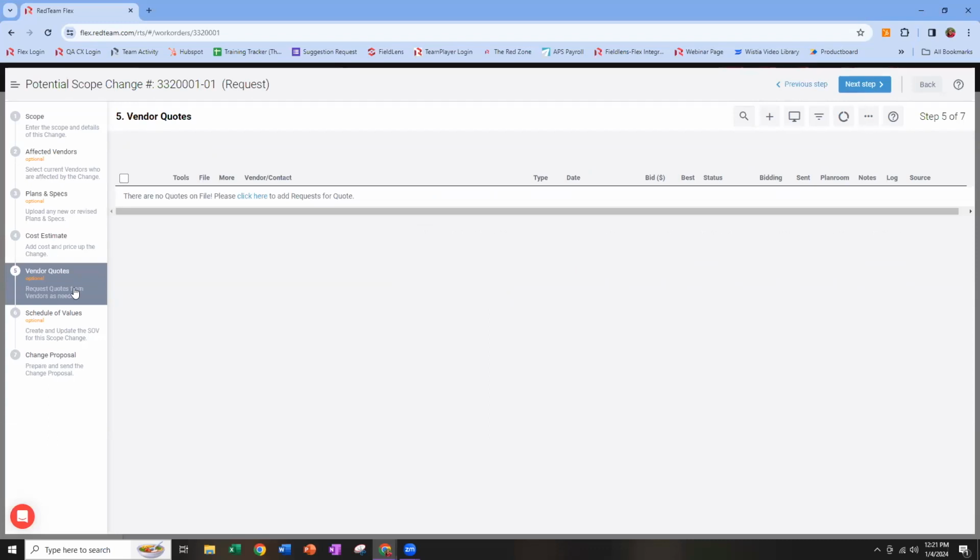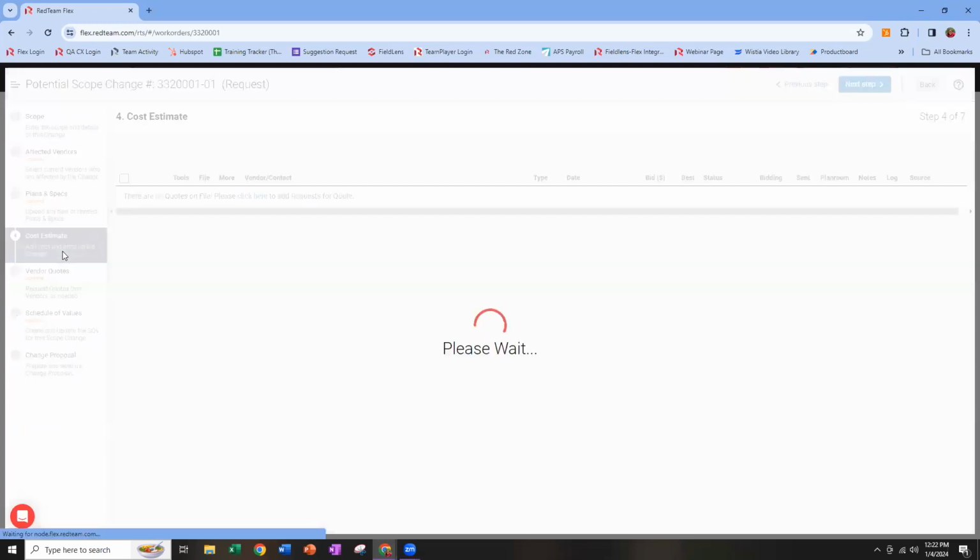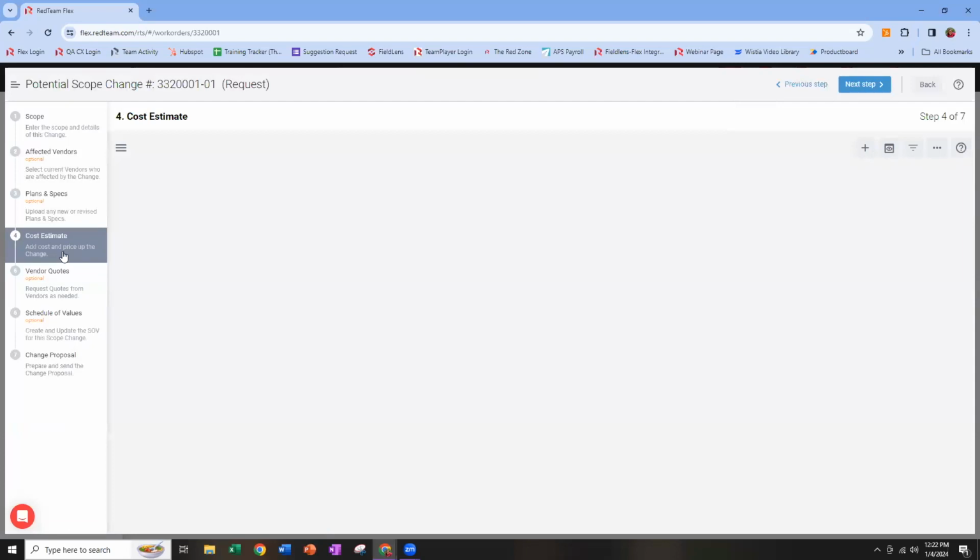The other thing I want you to keep in mind is that there's now kind of two options for how this step is going to play out. What you're seeing here is the traditional RFQ process in which we would send out invites per cost code. That's what we've historically had available. But if you are already utilizing our new bid leveling feature, whereby you can create bid packages here on the estimate page, the same bid leveling features are going to be available.